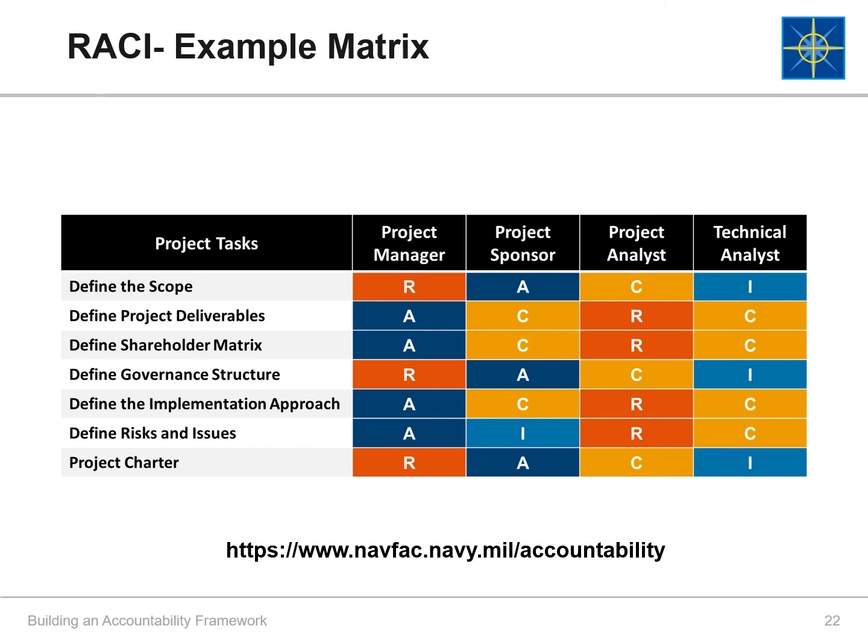On this slide, you can see a theoretical project. This is just to give you an idea of what one could look like. What you would do is break down your project into individual tasks or steps and then assign the responsible, accountable, consulted, and informed parties for each task. These are the tasks and people that you've already identified in your 6-step process.